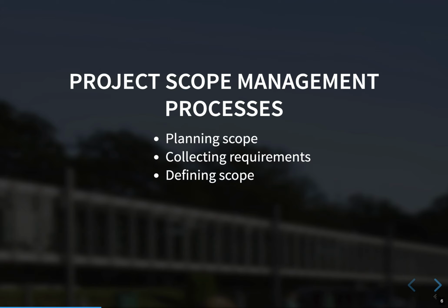Things like reviewing the project charter and all the requirements documents. Have a look at all the organizational process assets which are already there. Make use of templates which are available in your company. And use all this to create a so-called scope statement document.